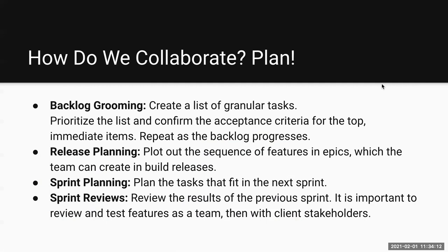Invest in backlog grooming. Release planning, that's that high level, that broad scope that we were talking about. This is not about tasks. This is about the features that capture all of those tasks. This is the what, not the how. You're producing a blog section, you're producing an event calendar, you're producing a shopping cart, you're producing product pages, whatever it may be, you're itemizing those things, not too granularly, just more of a concept.